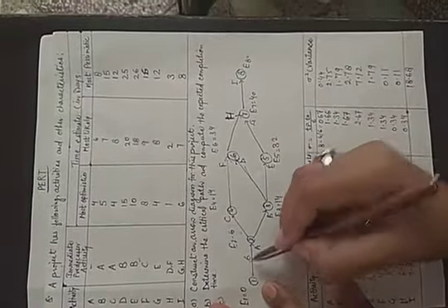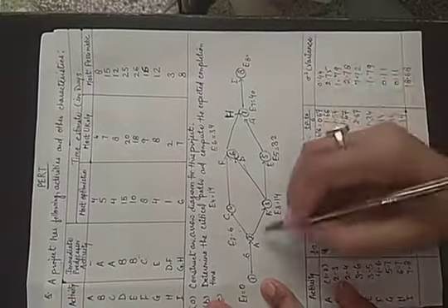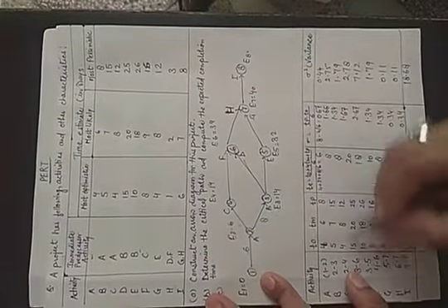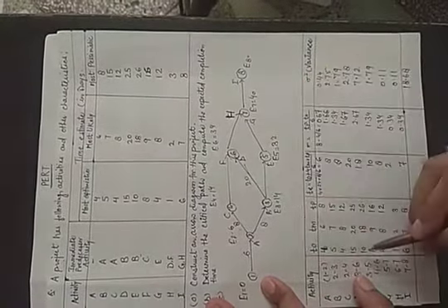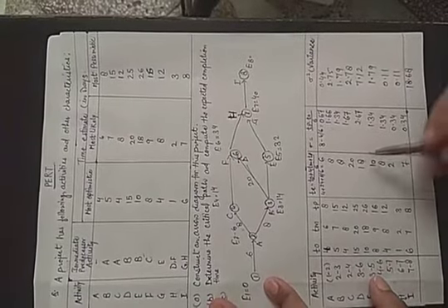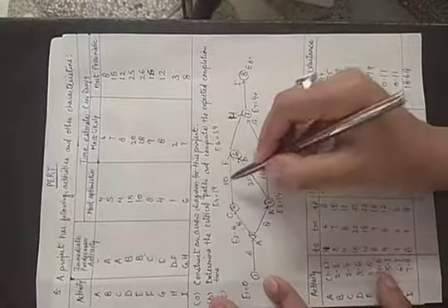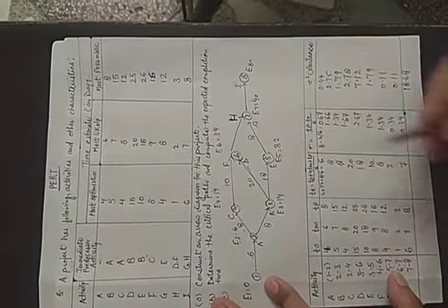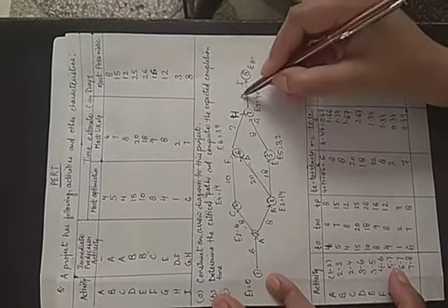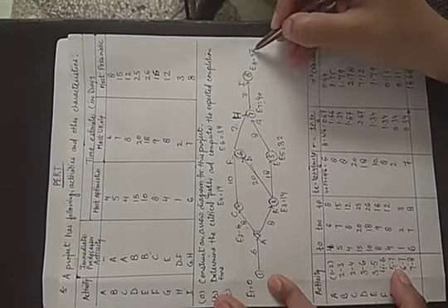We can write also: 1 to 2 is 6, 2 to 3 is 8, 2 to 4 is 8, 3 to 6 is equal to 20, 3 to 5 is equal to 18, 4 to 6 is equal to 10, 5 to 7 is equal to 8, 6 to 7 is 2 and 7 to 8 is 7. So 40 plus 7 is equal to 47.